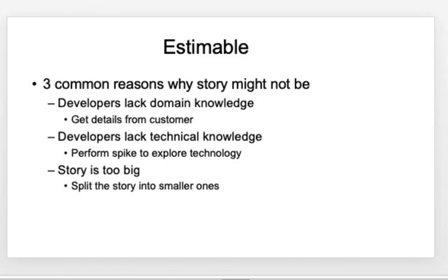Estimatable. Why might estimatable be difficult? There are 3 common reasons. Developers might lack domain knowledge. Then you should get the details from the customer. If the developers lack technical knowledge, please do knowledge sharing. And if the story is too big, split the story into smaller ones. Simple solution to make estimatable user stories.